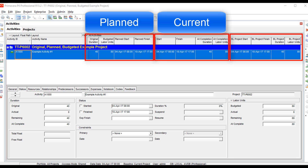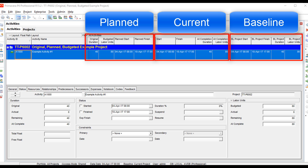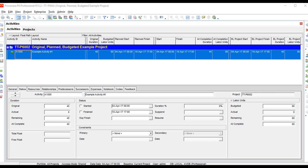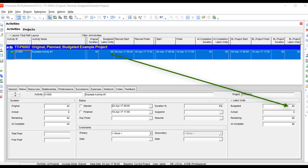Group two fields are the ones you'd be viewing during execution. The third group is all of the baseline data, which you view during execution when comparing against group two. Let's focus on group one. The original duration, also found in the status tab, is the duration you put in when building your plan. The budgeted labor units, also in the status tab, are calculated based on how many resources you assign against the duration.